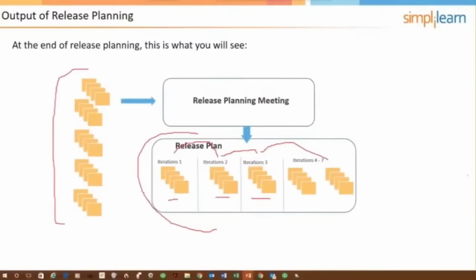It's called rolling wave planning, where we do detailed planning for things in the near term in tandem with high-level planning for things in the future. Did I say that right? And we talked about deciding as late as possible, I believe, meaning that it's better to actually plan the later releases for purposes of making sure we have the most information available.